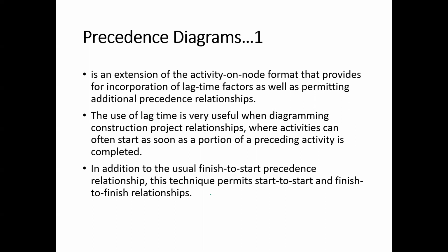But during the curing process, there is essentially not much work which is done. So instead of claiming curing as a real work on the project, you can also put curing as a lag time between the network. So for first pouring, and then if you are doing the next formwork construction, between that formwork for the next floor and the curing and the pouring of the concrete for the lower floor, you can put a lag time of say 4 days to allow for the curing.